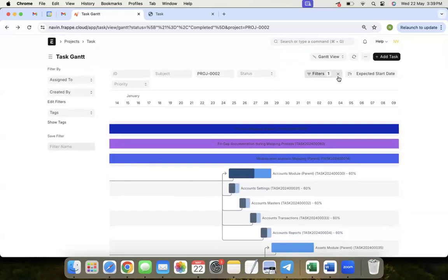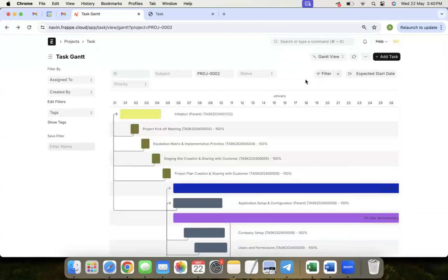And another thing: if completion can be time based, that means we are giving a start date and end date, then we know it takes 10 days or 20 days to complete, and based on the days we can show how much is completed, instead of manually giving task completion. Maybe one task takes 10 days, and another second task may take only 1 day. Correct.